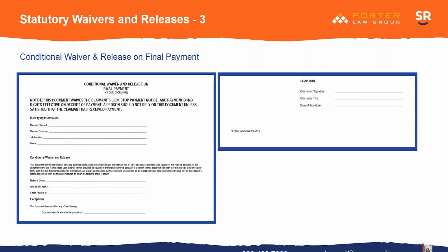So you would put in there something like a dollar amount, and then you would say something in the nature of, for disputed change order number 3, or on the issue discussed in email of 10/24/2024, something like that, just to identify everything is resolved except for this one issue. Okay, and then you would sign it, etc. So that way you would have a conditional waiver and release. They would give you that check, and you'd only have this one issue hanging out there that you're yet to resolve, and then you would turn probably to your contract, and you'd look at it and you say, okay, what are the methods that we have to use to resolve this?